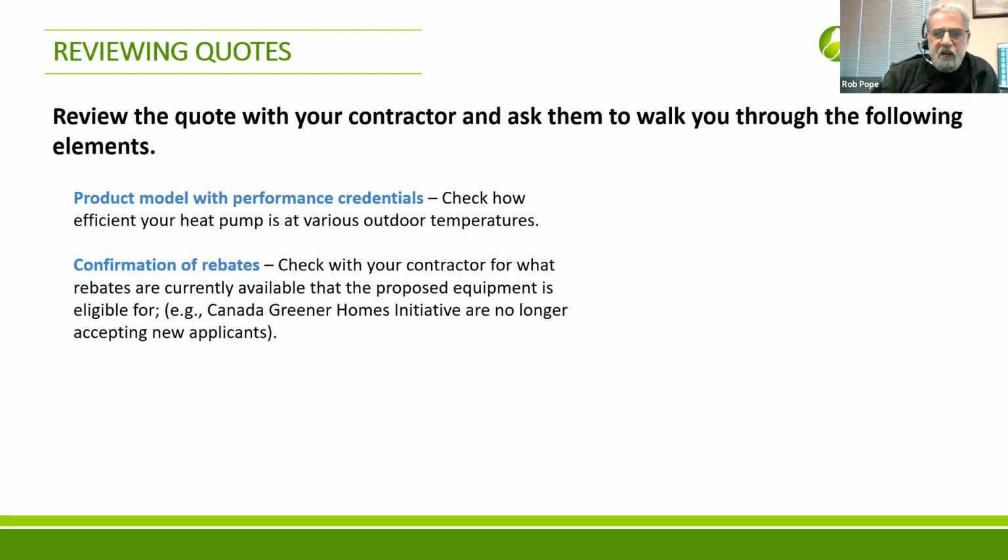Review the quote with your contractors. You got to make sure you got actual model numbers in there. Not a quote that says, I'll give you a heat pump or a furnace, but doesn't say what the manufacturer, the size, or the model number is. You need to have that information so that you can do some verification. Do your own little research, because you can Google that model number and find out all kinds of stuff. And you want confirmation of rebates if there are rebates available.